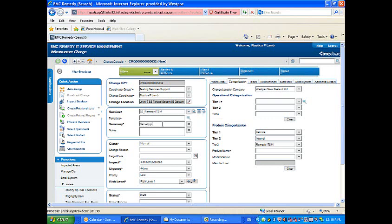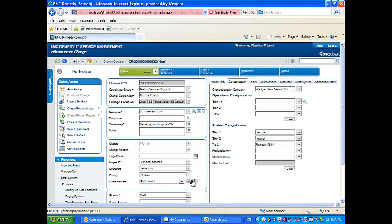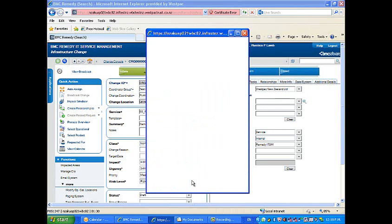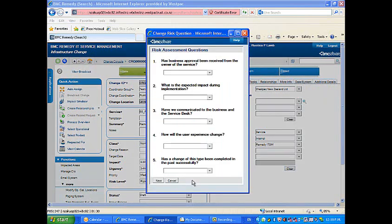Complete all the mandatory fields, those are the ones in bold. Click the button at the end of the risk level field. This displays 10 risk questions. The risk level will be set on saving. How the questions have been answered are found in the risk report on the functions menu.